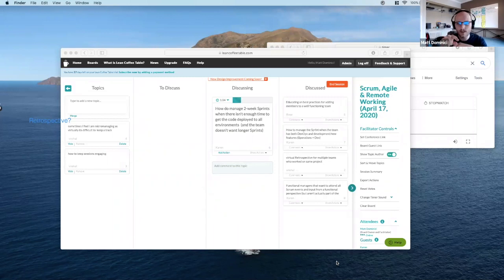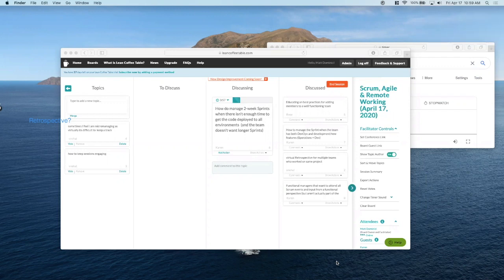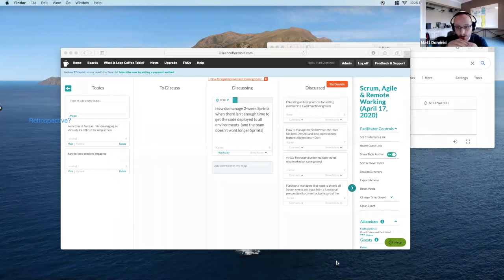And then the next sprint starts and they start developing new stuff while the people are still testing the stuff from the previous sprint. And it just kind of gets out of control. So, I mean, you could try extending, you could try 3 weeks and see if you get to a plateau, but usually, it may be okay for a little while, but eventually you're going to run into the same problem. And it's a tough one, because without changing the underlying technical practices, there isn't really a lot of process or management that's going to be able to make up for that. I don't know if anyone else has had similar experiences with that.